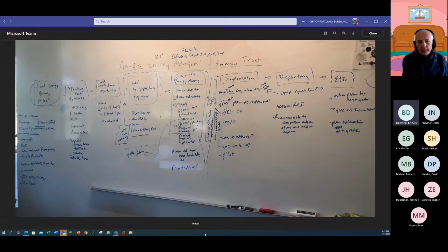Again, it's based on how difficult or how much money would be needed to accomplish that project. So our quick wins could be something in-house. The gem we might do through what we call our R&M shell, like a repair, rehab, maintenance, and then going up to CIP.